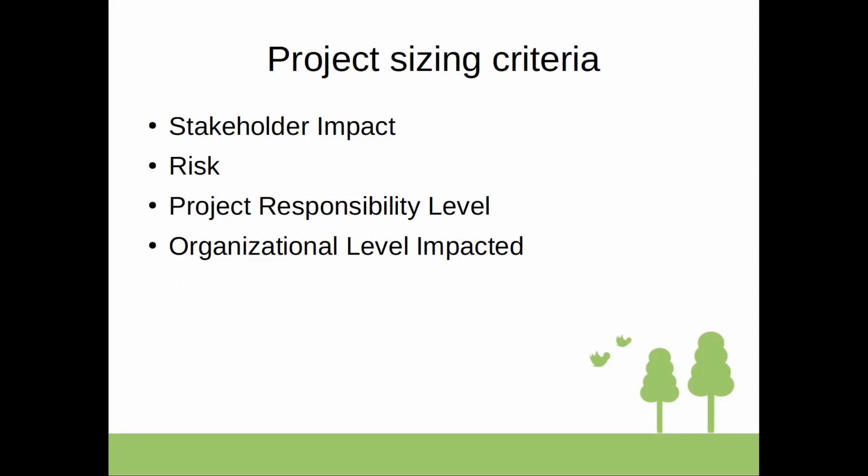So then you will have criteria that you can use to quickly estimate at least the area of the cost, how much this particular project would cost for the customer. Again, this can only be based on prior experience or similar projects, because you can't out of the blue just say that's how much effort I need. It never works. You need to base it on something.